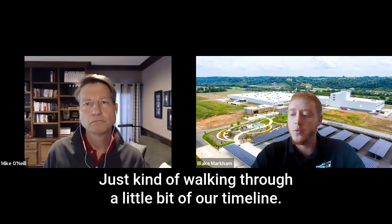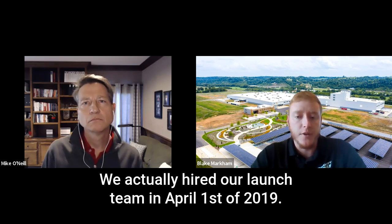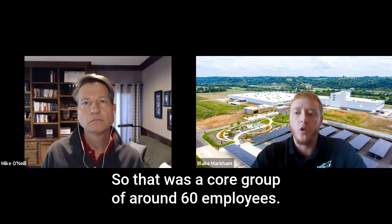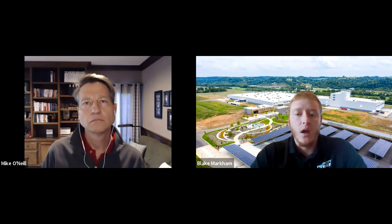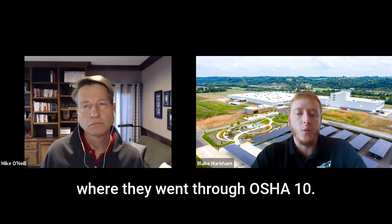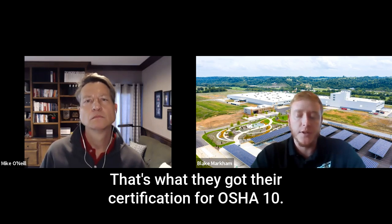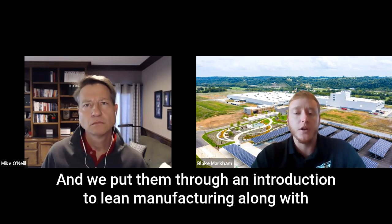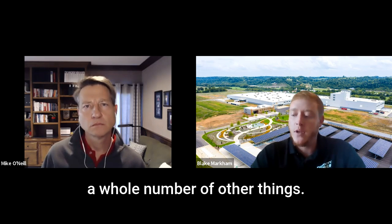So just walking through a little bit of our timeline, we hired our launch team on April 1st of 2019. That was a core group of around 60 employees. They all started in April. We put all of those employees through a 1-month orientation where they went through OSHA 10, so they got their OSHA 10 certification. We put them through an introduction to lean manufacturing along with a whole number of other things.